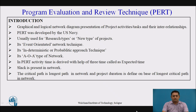PERT is a graphical and logical representation of a project and its activities. It was developed by the U.S. Navy and is usually used for new types of projects, such as R&D or research type projects. It is an event-oriented network technique and is a probabilistic type of technique, represented by the AOA type of network.